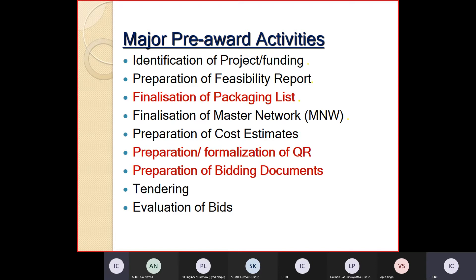For interstate transmission systems it is done by CTU and for state projects it is done by STU, and finally it is finalized by CEA through various committees.